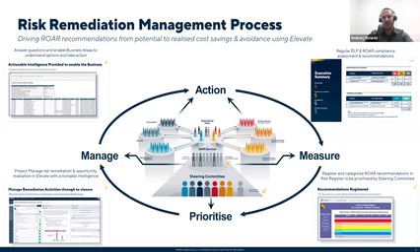And we determine the priority, based on the financial impact, on the likelihood, so what is the chance of occurrence of this risk? If it's a high chance of occurring, or maybe low, maybe it's something which is not so important. And the velocity, so how fast it will strike us.